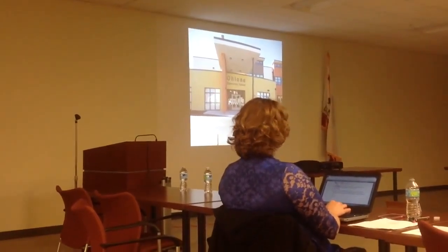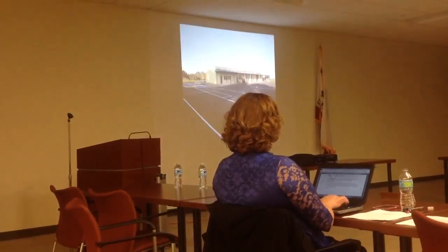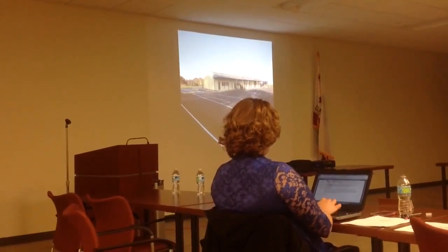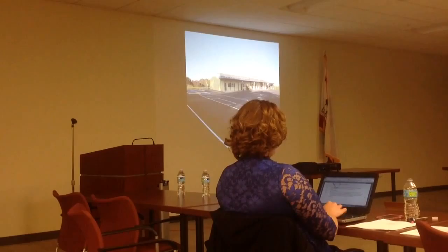The Lona project, this is one of the ones that's in closeout, so this is just a photo for you. Montalban, we moved furniture in last week. We're finishing off the last of the punch list items, and this will be turned over to the school early next month.